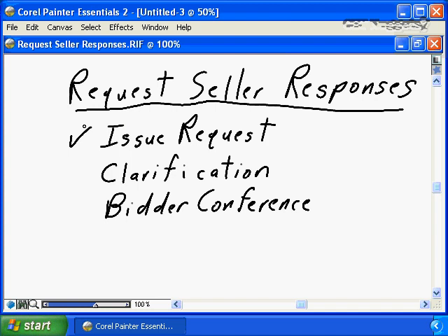Maybe your company has purchased the same type of product or service in the past and has a pre-qualified list of vendors who provide it, in which case issuing the request is as simple as contacting that list and saying, here is my current request, please respond with how you will satisfy this. Perhaps you need to advertise a little broader than that. Perhaps you need to advertise in the local newspaper saying, my project needs to buy X. Please respond with your intention to submit, and I would be more than happy to provide the full RFP to you.